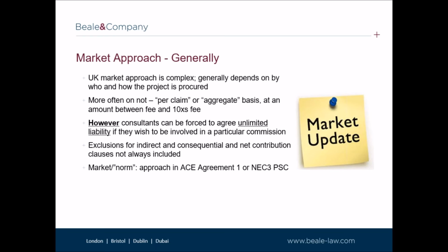It will also usually include a net contribution clause which seeks to limit liability to that which is just and equitable on the basis of the consultant's responsibility for the loss. We discussed the standard industry appointments previously, and these generally contain limitation and exclusion clauses. In our view, the position in the standard industry appointments in relation to limitation clauses is considered by consultants as a norm or market.